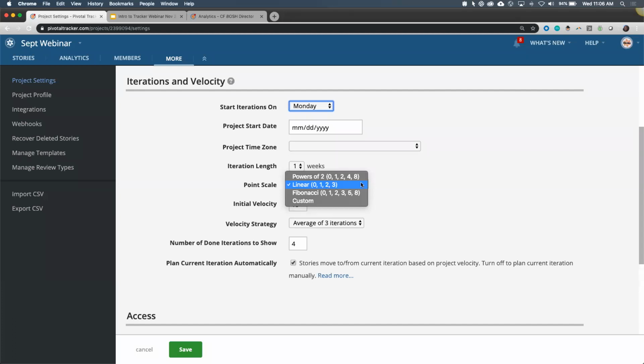And story points are not really intended to represent time. We're not thinking how long is it going to take us to do this story, because a lot of times when we first create it, we don't know. We may not know enough about the story yet. And if you give it to your most senior developer, they're probably going to get it done faster than if you give it to your junior developer that just joined the team yesterday. We're going to give the junior developer a break and assume he may take a little bit longer. That's okay. So the story estimates, those t-shirt sizes, those small, medium, large, extra large, they're really there to represent